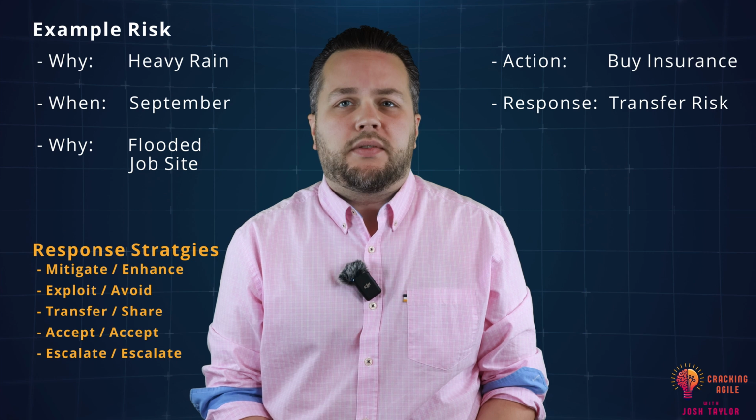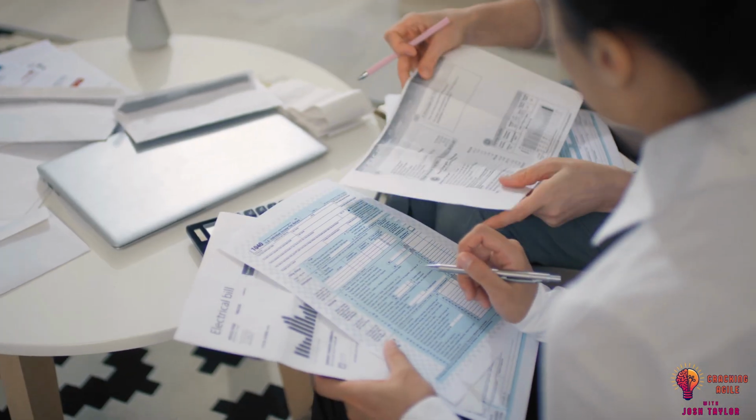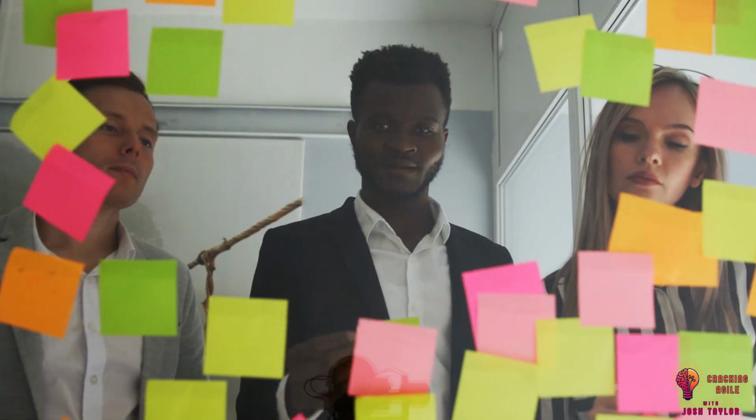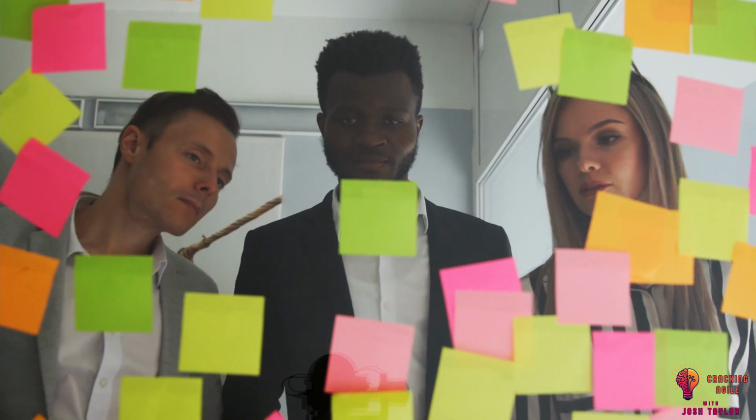This whole topic regarding risk responses deserves its own individual video, so we won't get too far into the weeds here. What you need to know is that all of this information, regardless of the type of analysis, should exist within a risk register. Similar to the previous processes, you may jump back to the determined budget process if you need to purchase insurance for a high probability risk, or hop over to the WBS and define a new work package if you've figured out a new deliverable is required along the way.